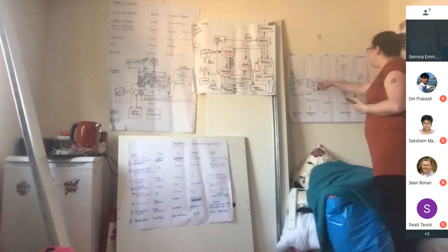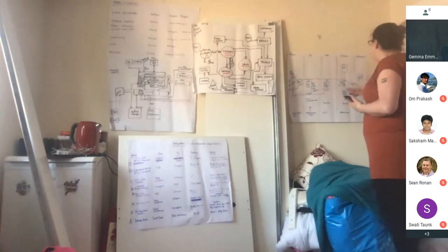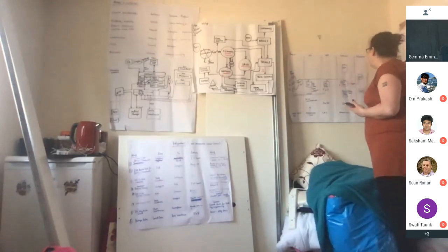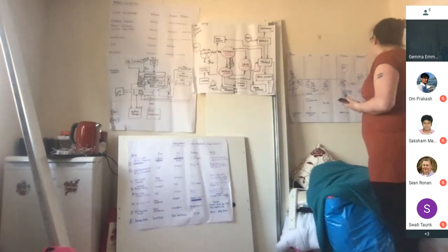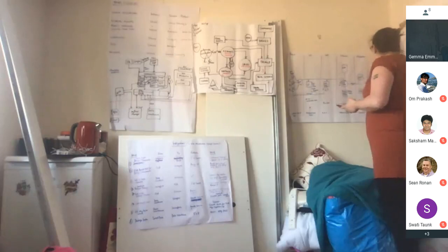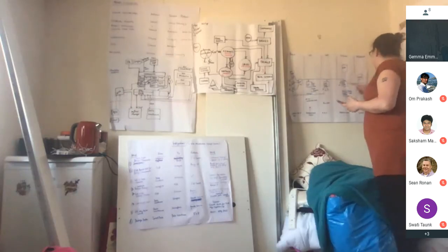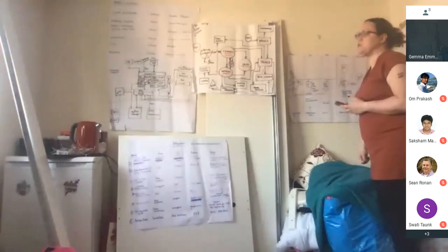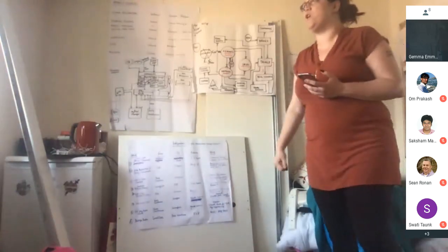And then once we've performed our dress rehearsals on the data migration and any performance tests, if there's any changes, it will go through the process again. But then we'll create change sets to deploy all of our code and configuration metadata to the production environment. Once we're live, at that point we will also produce another partial copy sandbox, which is for hot fixes.